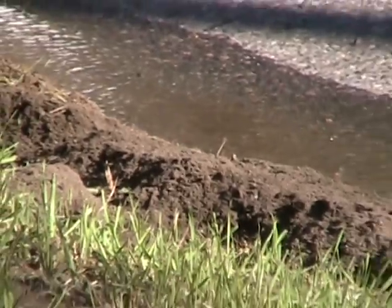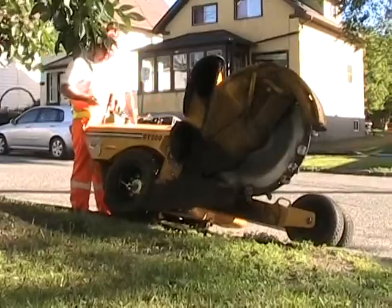Well, the Parks Division is involved heavily in the planning of road construction where trees are involved. So when we become aware of the next year's capital projects or even the following year's projects, I'm asked to go look at the streets, comment on the type of impacts, where perhaps they could minimize damage. For example, with sidewalks, we don't have to dig down the 2 feet general excavation. There are times where we can come up over the roots and then dig down between the drip lines and then come up again over the roots and then go down. So there are new options that we've started trying in the city of Thunder Bay.